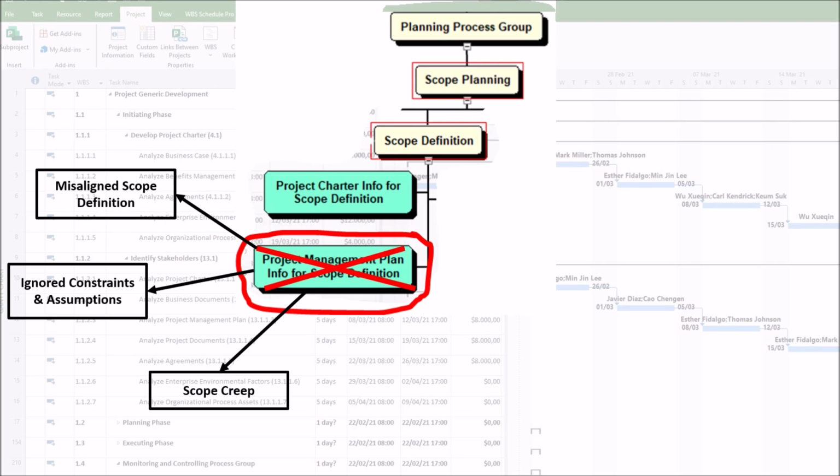3. Scope creep due to weak baselines. If the project management plan's scope baseline, such as preliminary WBS or scope statement, isn't reviewed, the team might miss critical exclusions or dependencies. As an impact, uncontrolled additions to scope can derail schedules and budgets.